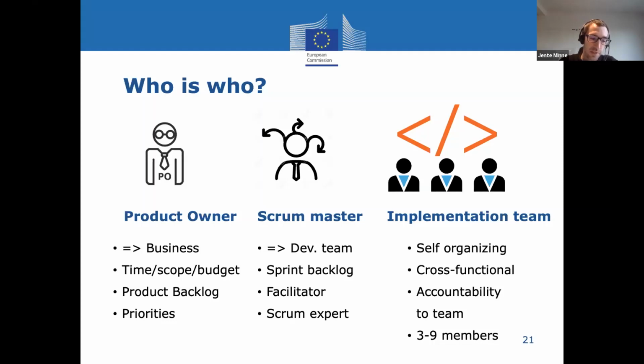But of course, sometimes you have very specialized people that have very specific skills that you need in different teams, and then sometimes you have to attribute them, for example, 50%, 50%. So it all depends. There's not one rule that fits all. This dedication can cause extra tensions if you start splitting people, because there's another product owner, and you can get fights between product owners, and it can make it more complicated.